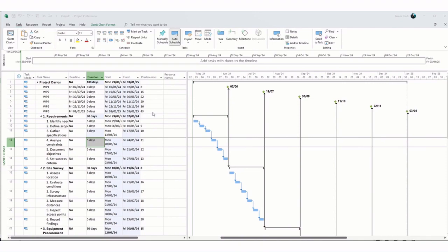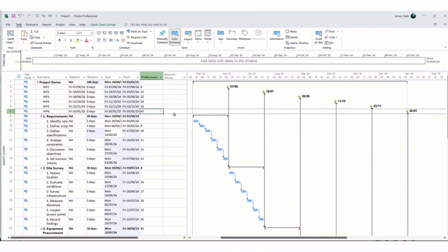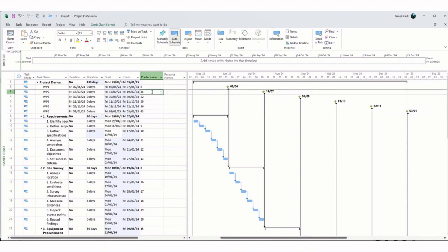Now, for the purpose of this exercise, what we're actually doing is monitoring success. If we're measuring milestones, it would be when we anticipate these milestones to be completed compared to the baseline schedule. Compared to what we originally set out under the contract to achieve, what are our forecasted completion dates?